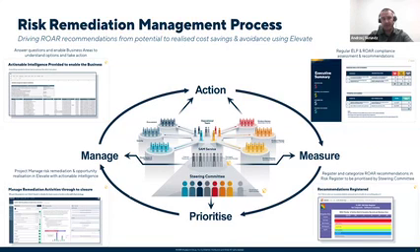For each risk scenario, we have a response. So based on the recommendation from the ROAR, which is attached to each scenario, to each risk, we have a response. It might be multiple responses, and the response is basically how we will manage the risk. It's the task.